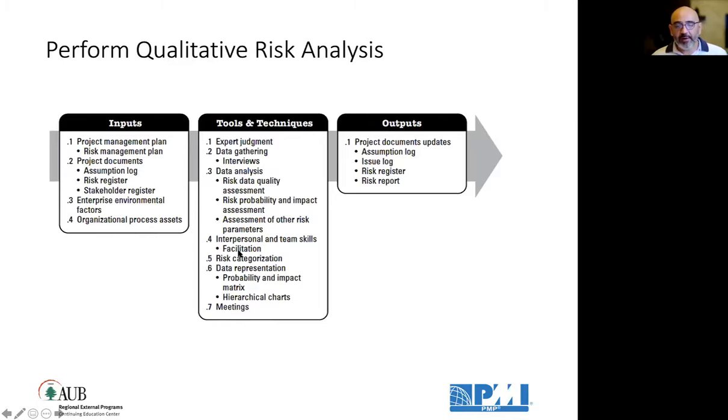Okay. We've identified all possible risks, but they are a huge number and we cannot manage all identified risks. Therefore, we need to analyze them qualitatively and probably then quantitatively to give them a dollar amount impact, or to filter those high risks, so we can apply a specific strategy, and the middle and the low risks to approach them differently.